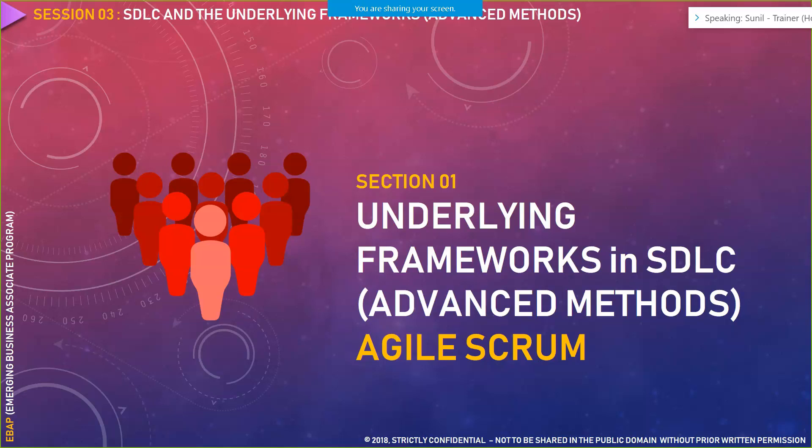Why are requirements not that clear in agile? Because in an agile context, you do away with comprehensive documentation. In waterfall, we had a Business Requirements Document of 300 to 400 pages detailing everything, which typically took three months. But in agile, requirement gathering happens in parallel with development. You don't have that much time, so instead you write user stories. You need not write comprehensive documentation as was the case in primitive methodologies like waterfall.